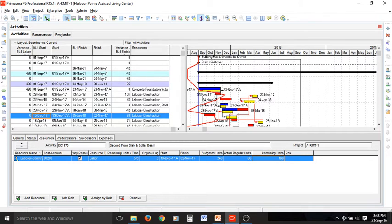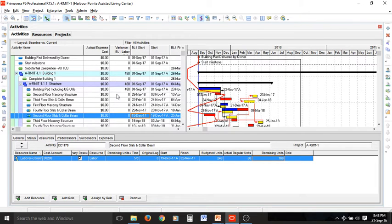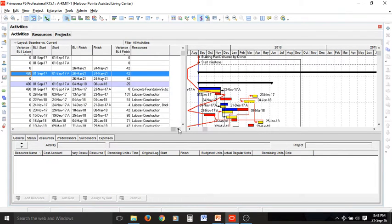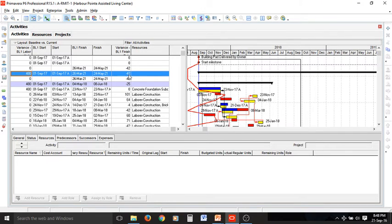The variances can also be seen on the left-hand side. We can look at the variance baseline finish date, and for the whole project we have 42 days of delay. This is because of delaying the very first activities in the project, and the cascading effect is transferred and transmitted to all activities of the project.